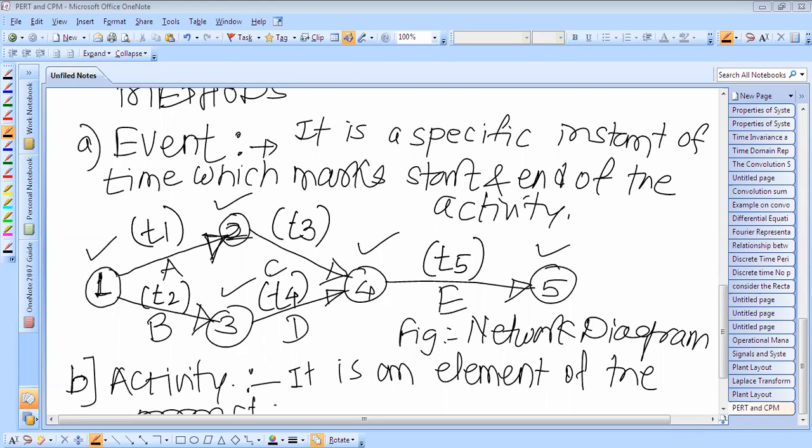Suppose we have to install machinery in the laboratory, and 1 hour is the standard time for installing the machine. If it takes 2 hours, then that activity becomes a critical activity. An activity is called critical if the earliest start time plus the time taken by it equals the latest finish time.